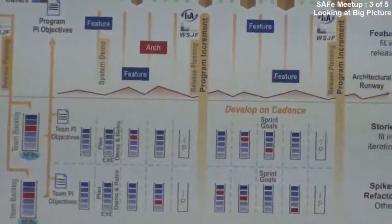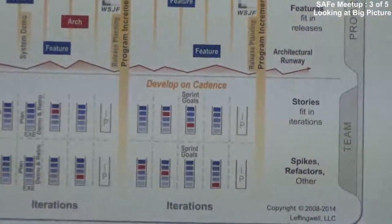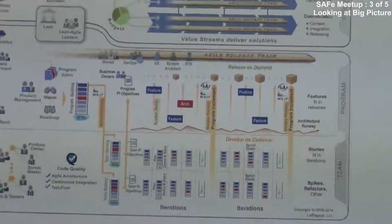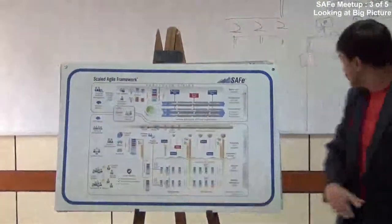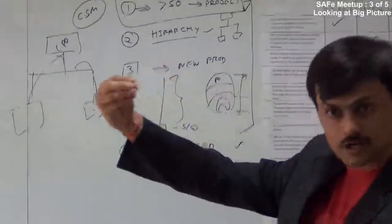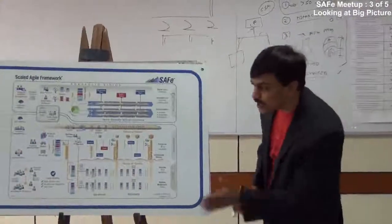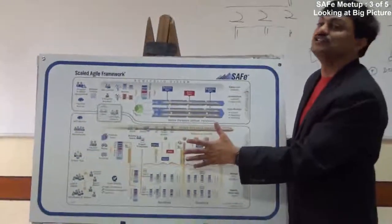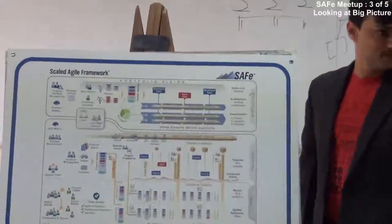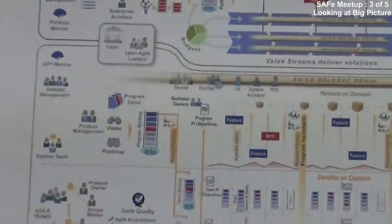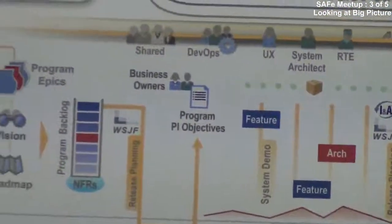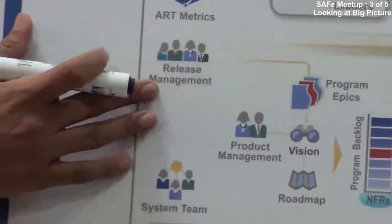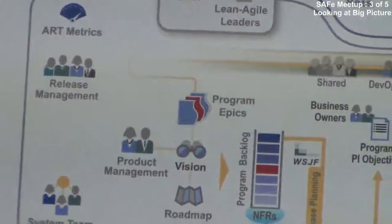The third layer is our normal agile teams. They work on iterations as before, but they also work with release planning and program-level planning done across the two upper layers. The hierarchy of product owners, hierarchy of scrum masters — all of that sits here. The chief scrum master is called the Release Train Engineer, who manages the release train. Release management takes care that the program train is on track and handles program-level dependencies and issues.